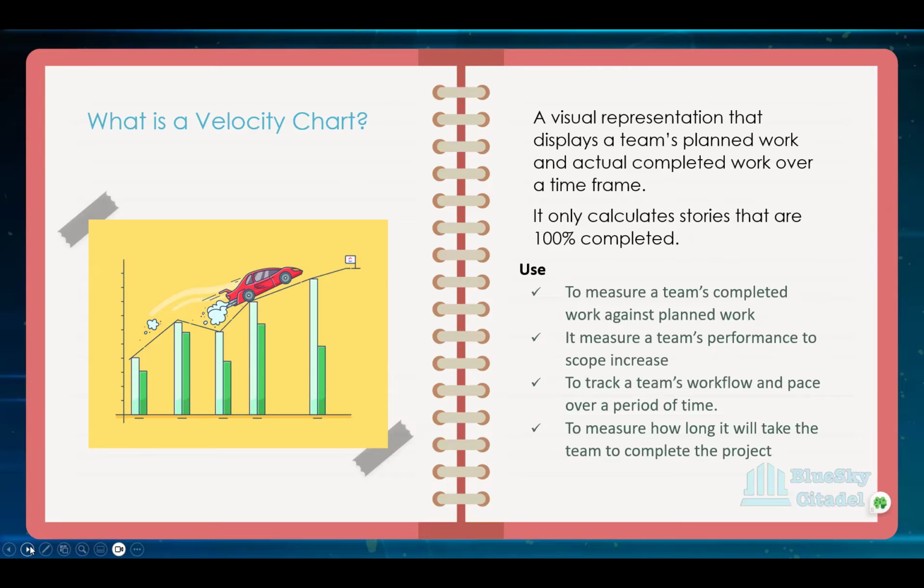So you can't know the pace of a team with just one sprint or with just two sprints. I think the basic standard they use is at least anything from 6 sprints would give you the pace of a team properly. But you have the velocity, definitely from the first sprint, it will give you what your velocity is. And then you can just use that to build your pace as you go along.